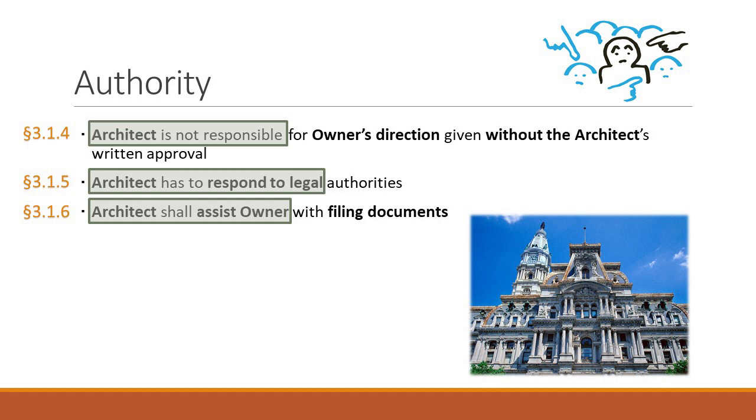So we had to put it in writing and clarify, hey, I only speak for you so much, but if you're going to go out there and do things separate from what I would handle, it's your cost. And if the contractor wants a change order for it, or if you want them to rip it out and the contractor doesn't want to pay for it, well, you approved it, you gave that substitution, it's your dime, it's your money, Mr. Owner.